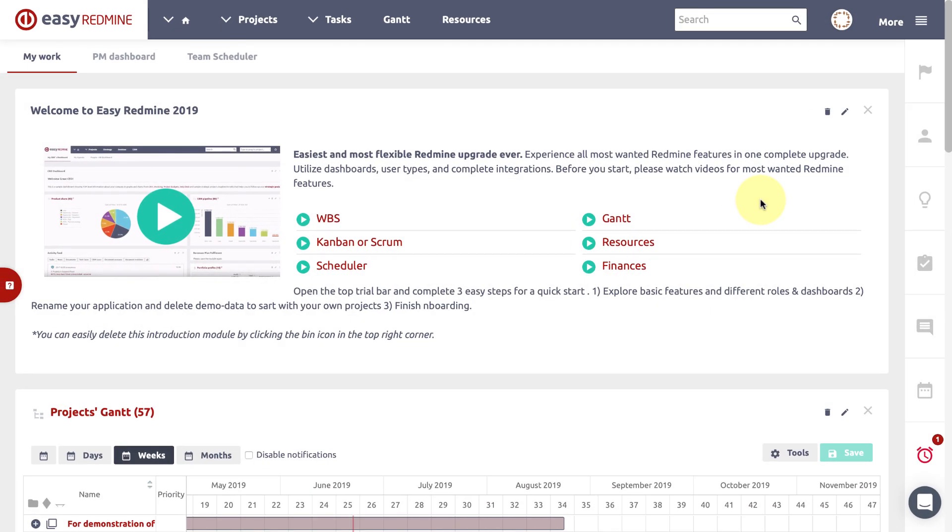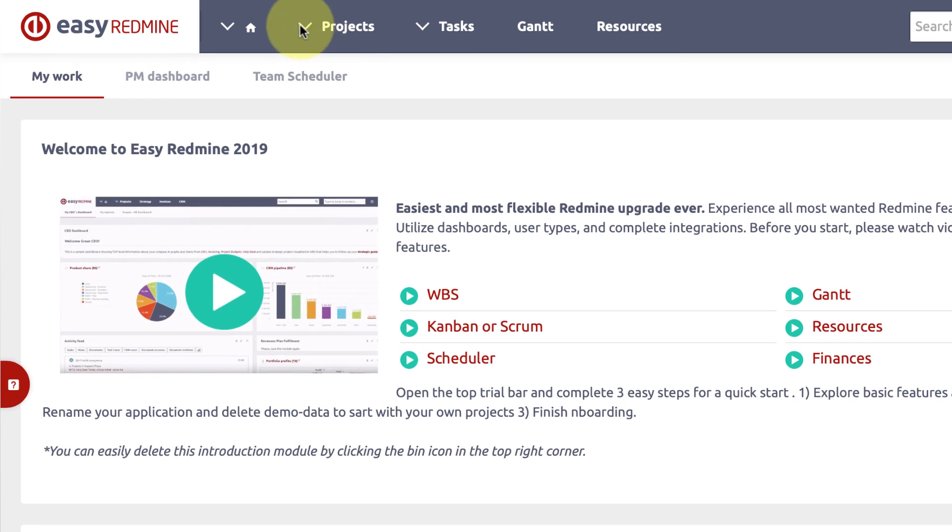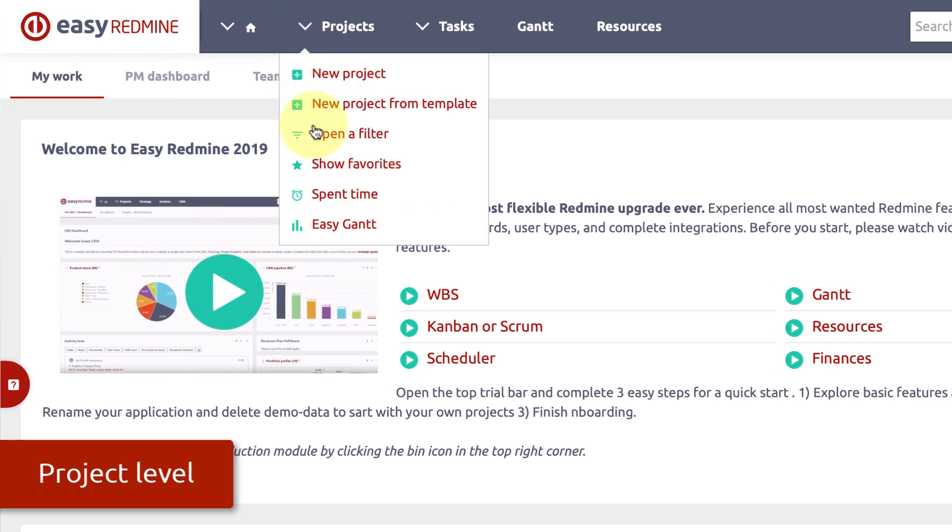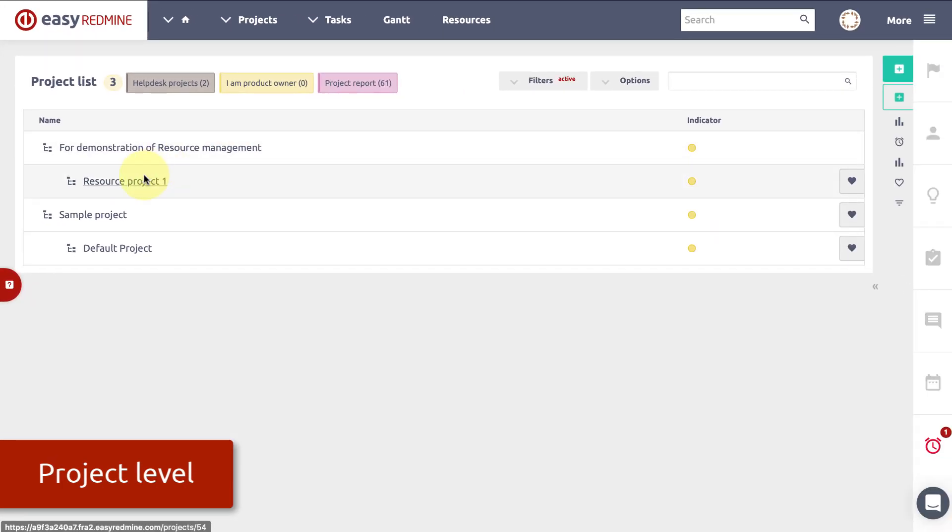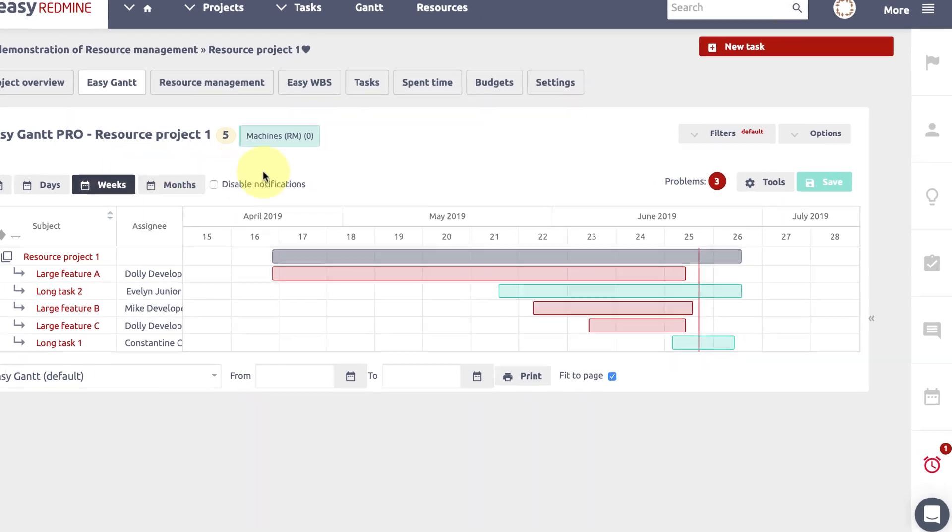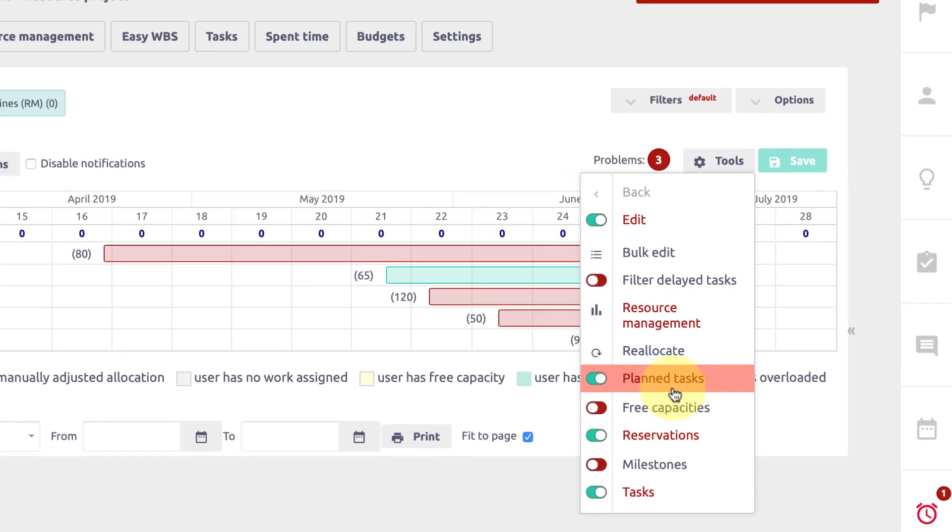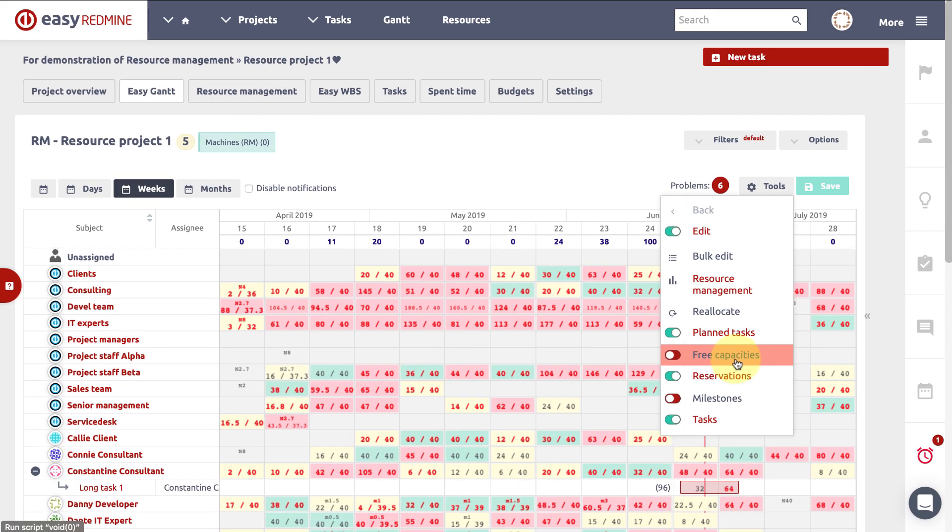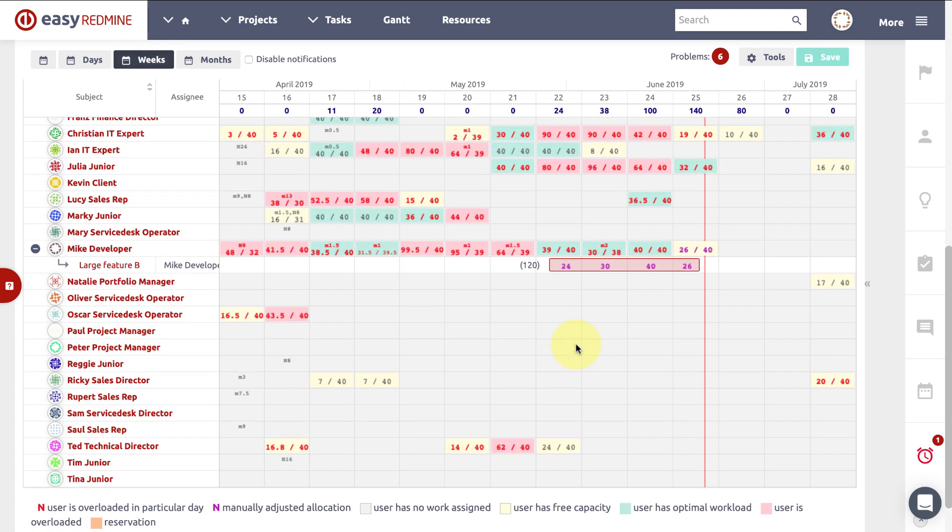Resource management is available on both a project and global level. Project level resource management can be found above project Gantt and allows the manager to distribute tasks among team members with regards to their allocations from other projects.